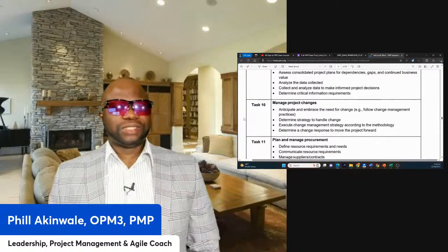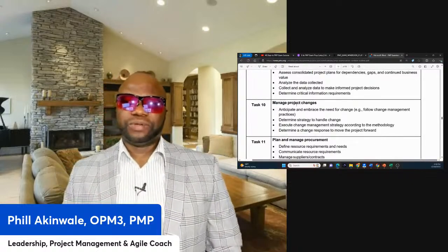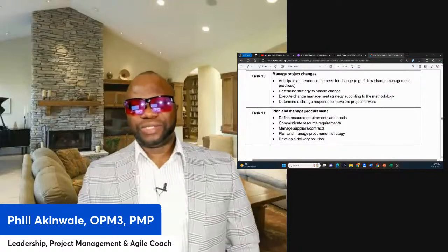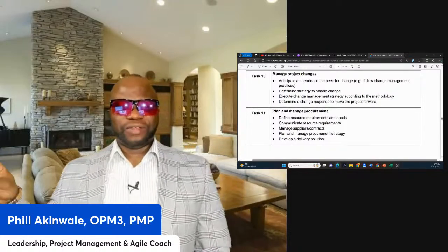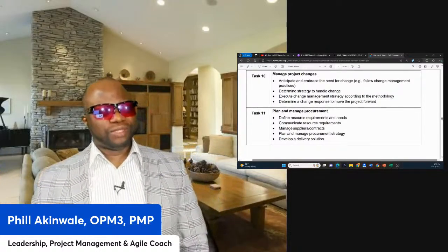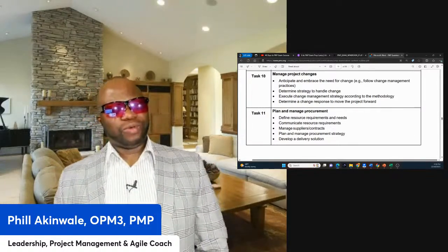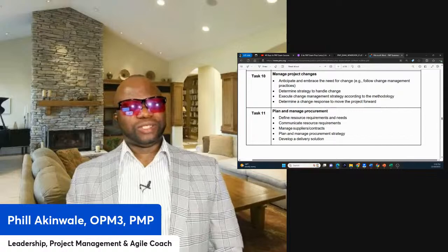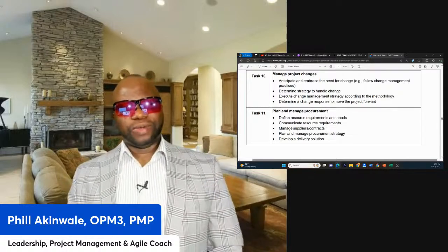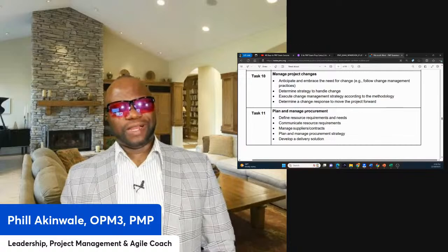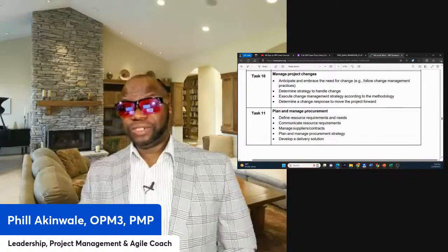Manage project changes. So the whole concept of the change request flow, which I have in certain videos on the Praision channel, watch that. Understand the flow from I get a verbal change request. What do I do? Well, you put it in formal writing. What do I do? Well, make sure it's in the change log. Okay, it's in the change log. What do I do? You review the change request with the team. You document what you've analyzed. You could send it on to the change control board.